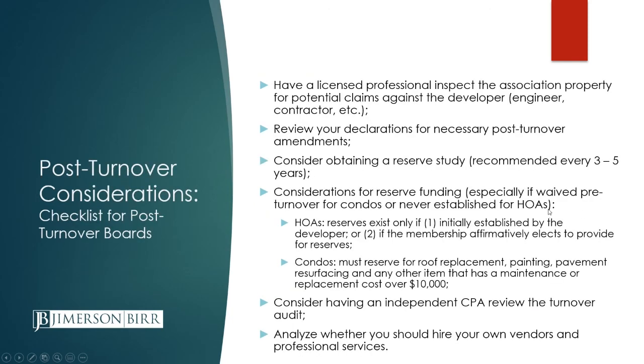All right, so here's a checklist that you got for post-turnover considerations. And so one of the most important things, I think, when you finish this process, other than all of the things that are required by turnover, is to have a professional inspect the association property for potential claims against the developer. And so you're not required to do this, but it's prudent to do it. There's nothing in the statute that indicates that the associations need to make sure that their buildings were constructed properly, and that there's no construction defects or other defects with the buildings that were turned over.